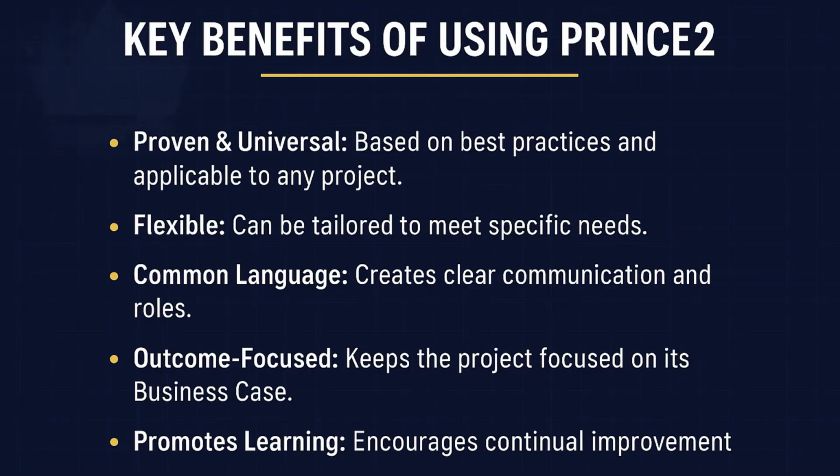What about tailoring the practices? The tailoring here would focus on robustness. The organization practice will be complex due to the contracts between the council, customer business, and the main contractor, supplier, and maybe subcontractors. Quality and risk practices will demand extensive formal documentation, audits, and checks because of the scale, the public money involved, and the physical risks. Much heavier than the data knowledge project. Makes sense. Heavy structure for a heavy project.